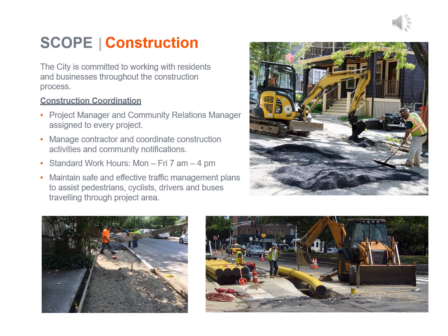Projects in the city have standard working hours of Monday through Friday, 7 a.m. to 4 p.m. We expect our contractors to implement and maintain safe and effective traffic management plans to assist pedestrians, cyclists, and vehicles throughout the project area.